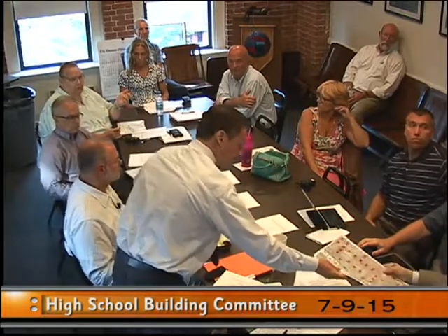Well, 7 of them are off the table because there's not enough buildable area. You've got to eliminate them. And now you're down to 4, of which one is the high school. Of those 3, I don't think you can repurpose the conservation land just because it's getting CPA funding. And whatever Parcel A is, it's going to require a purchase, which is not in the budget.